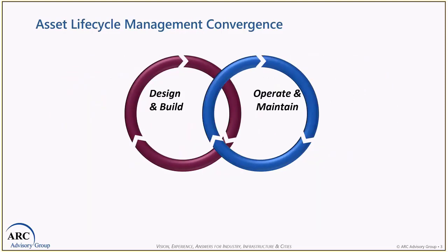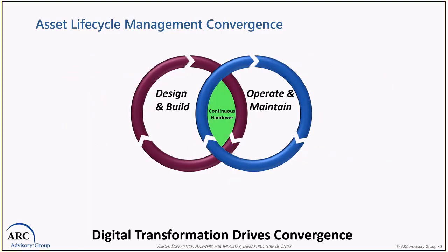As a result of digital transformation, we see this converging, and we see people moving to more of a continuous handover, where the operate and maintain people at particular stage gates will meet with the design and build people and pick up the appropriate documents, and also feed back to the design and build people aspects of the project that they need for good operations.